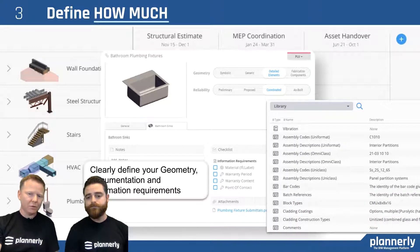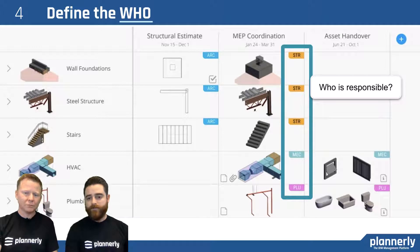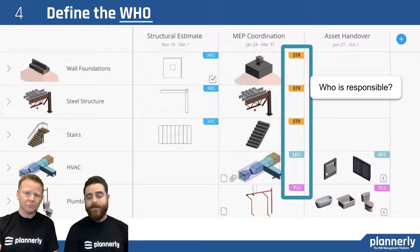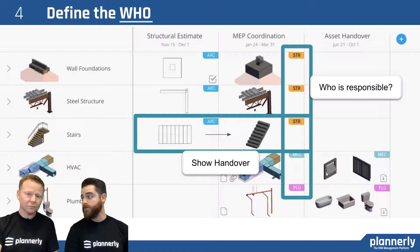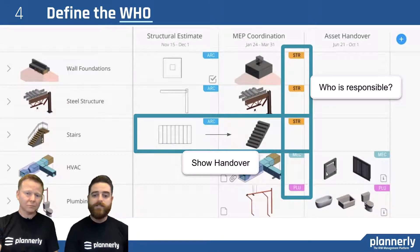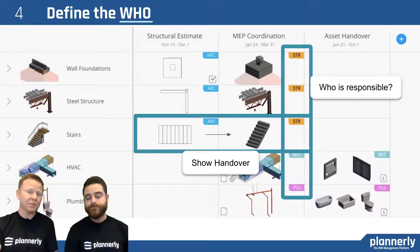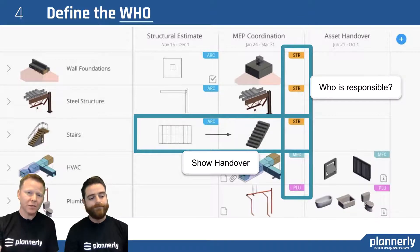Here are more information requirements that might be required. One of the most important things is defining who is responsible. The structural team is responsible for modeling the structural components, and we might want to show the handovers as well. For example, the architect may be responsible for the design of the stairs, but ultimately it's the structural team who will be taking over that model for coordination purposes — the thickness of the stairs, whether it's concrete, steel, pre-cast, or cast in situ, and whether there's some kind of requirement for space to install or service elements.